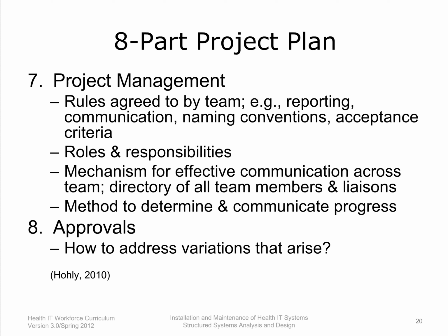Slide 20. Project management. Effective project administration is key to success. Ground rules need to be set into place outlining acceptable standards for providing effective administration, communication, and project oversight. Identify the administration policies agreed to by the project team that govern the way in which the project will be conducted. Such standards include status reporting, staff meetings, product review acceptance criteria, and celebration criteria. Describe which standards, if any, already exist within the organization and are appropriate for the project.